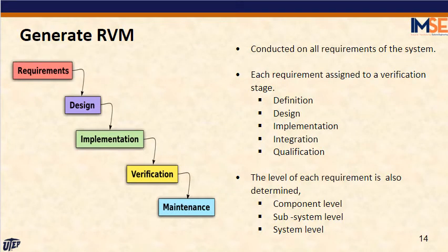So we created the RVM, requirement verification matrix, and basically it is to define in which stage we are going to verify a specific requirement.